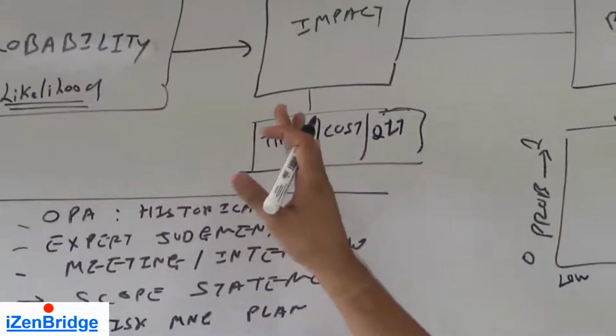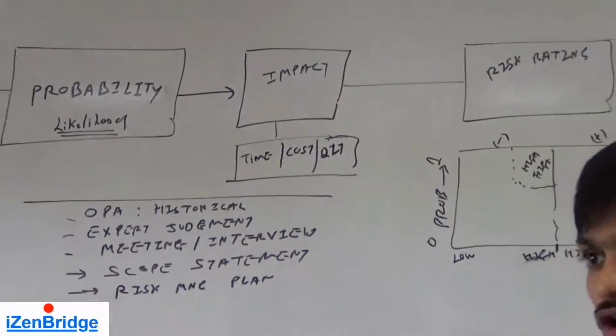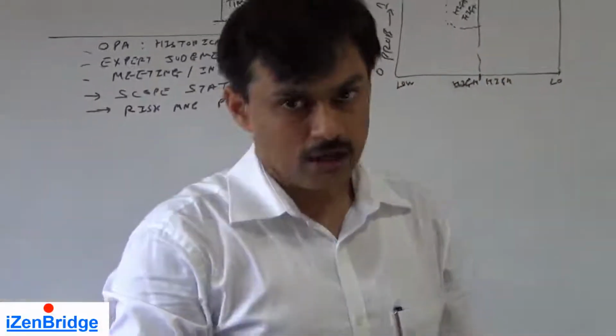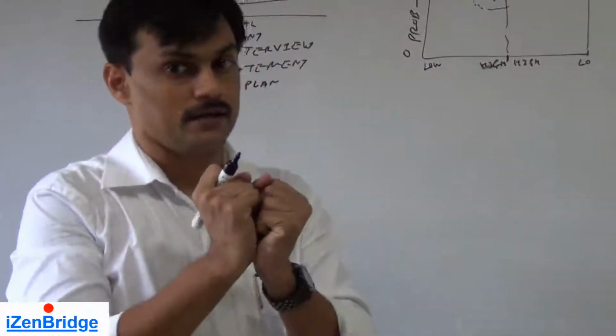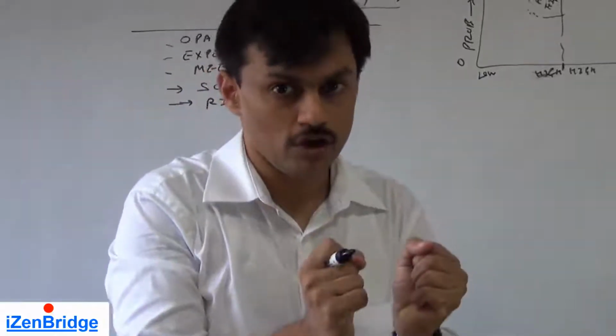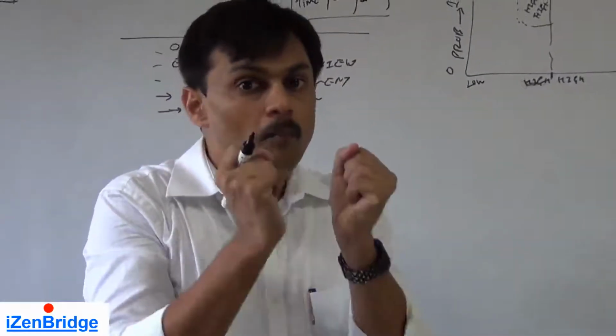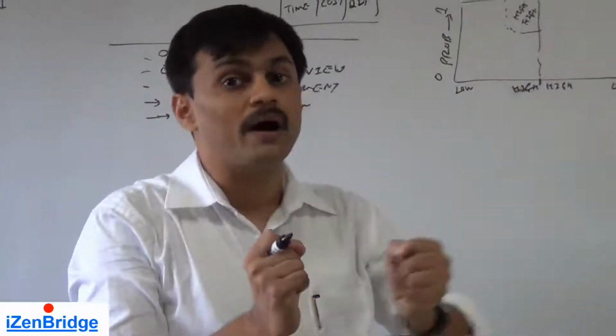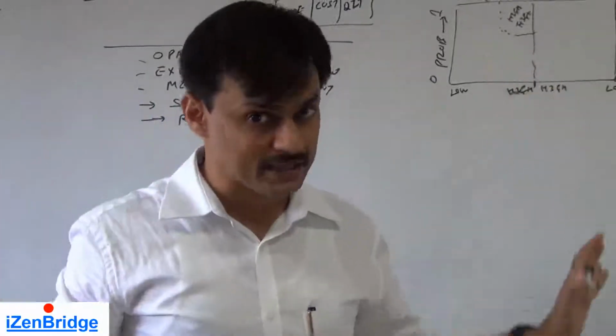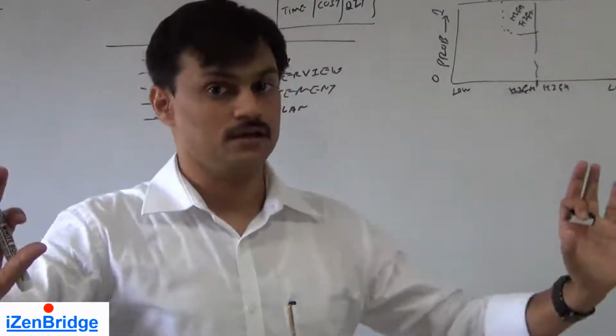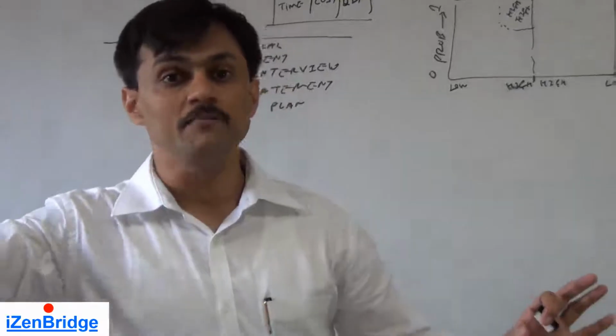Now what I am doing is trying to identify a factor by multiplying, or by weighted multiplying, the probability and impact. So let us take an example. For example, I have a risk that if a vendor delays his delivery for a given deliverable, my end deliverable or my end output will get impacted. So this is a risk: a delay from a vendor impacting your